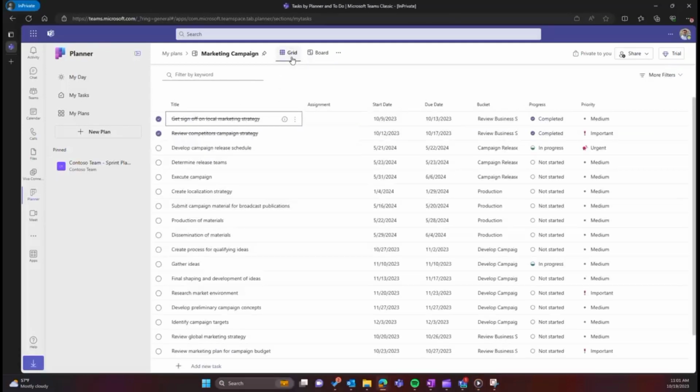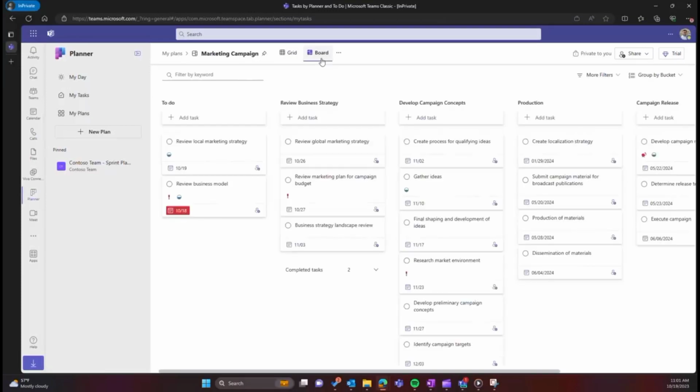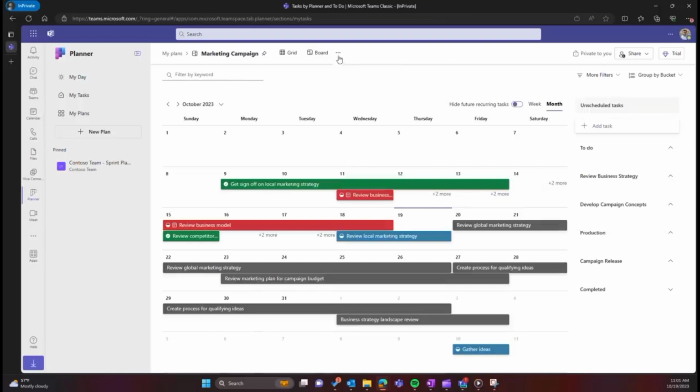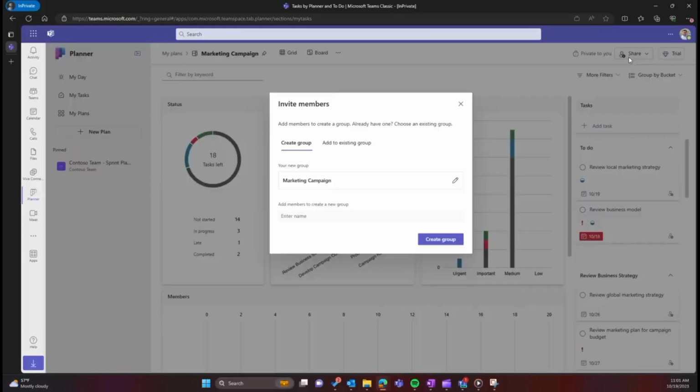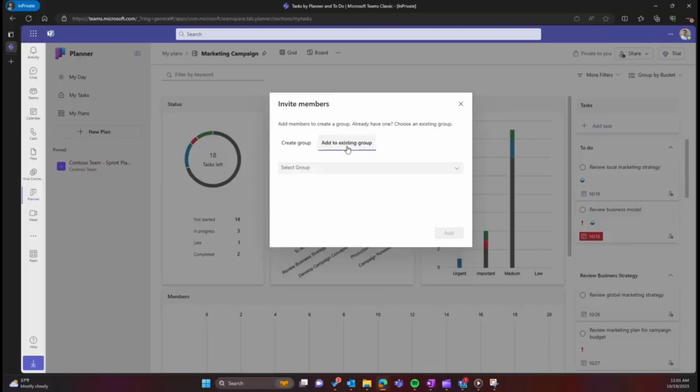Who is Microsoft Planner for? Microsoft Planner is a suitable tool for the following use cases: managing small projects, agile approaches like Kanban or Scrum. No resources or capacities need to be managed. No dependencies between the tasks are required. Linking to Project Online via a standard interface or via third-party tools.